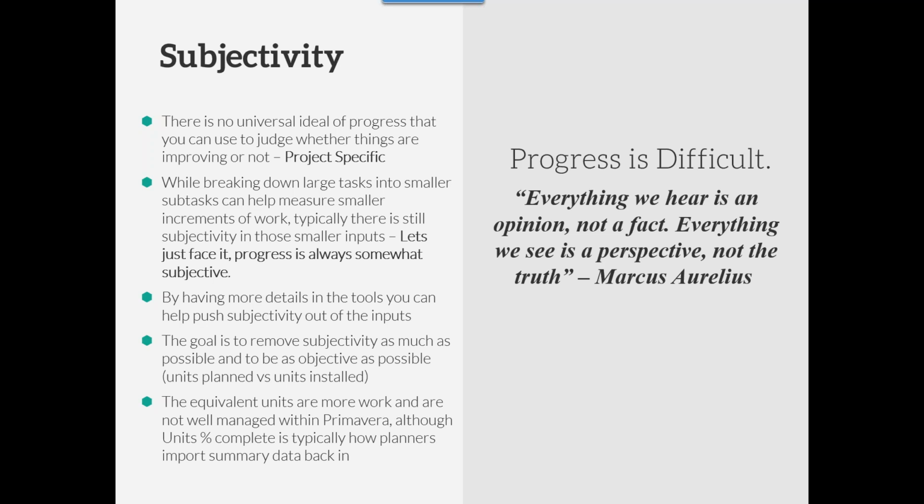When it was my job to track progress, that was one of the things where I tried to focus my time, really getting back to the fundamentals on what we've got to put in, how much we've installed, and really focusing on things we can track, whether it's a pour ticket for concrete or, in engineering, looking at the actual drawings that are IFC on the document control system. The more we can focus on metrics and units, I think the more we can help remove subjectivity for both the owners teams that have to validate progress, as well as for the EPCs and the constructors that have to report progress.